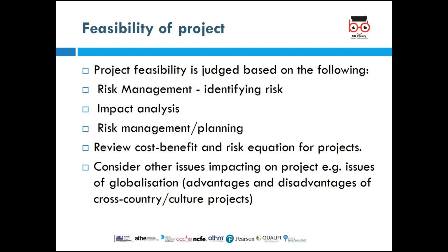So during the feasibility studies, we have what is called risk management, where we'll be able to identify any possible risk that will come up if we are doing the actual project. We can look at the impact that the project will have. If it's a dam that we want to construct, a feasibility study can help identify the environmental impact of the dam when it is finished.